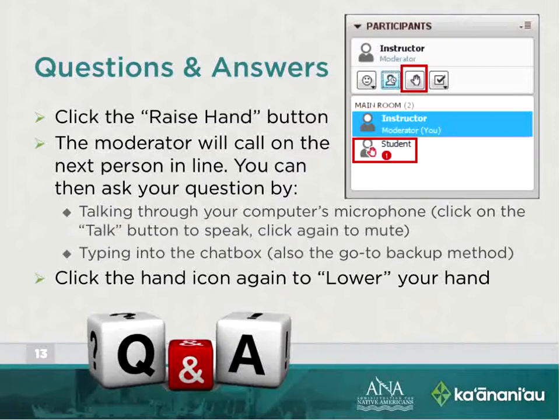And the other reason why we ask you to just give us a heads up about those things, or put us in the loop about the things that you can and have implemented, is to not only ensure that the official grant file accurately mirrors the current project you're implementing, but if you were to come in later for a carryover of unobligated balance of funds, the first thing we do is to see what unmet goals and objectives that were approved in the past year were not met. And so if you've implemented budget changes under your own authority, and we don't have notation of that in the official grant file, then that stops the review and approval of your carryover because we don't have a match.